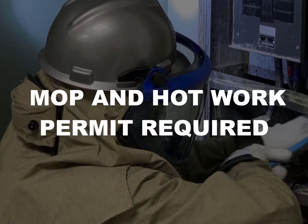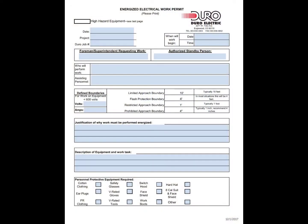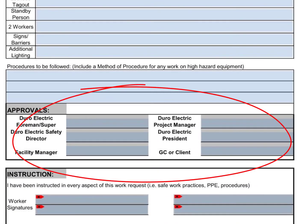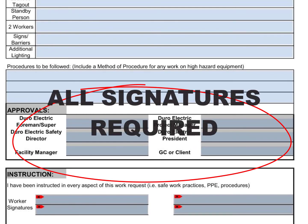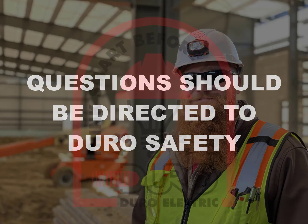Part of the assessment includes creating a method of procedure, and completing an energized electrical work permit. All permits must have signatures from the customer or general contractor, the project manager, the safety manager, and the company president. Work cannot begin until everyone has reviewed and signed off on the permit. If you have questions regarding any of the information contained in this video, please contact the Duro Safety Department.